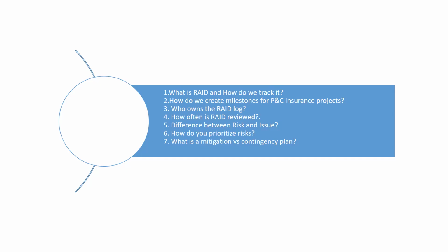The next question is: who owns the RAID log? You should know that the program manager owns the RAID log, because it is assigned to the accountable owner for the mitigation. Someone has to mitigate the risk, right? So that's why the program manager is the RAID log owner.